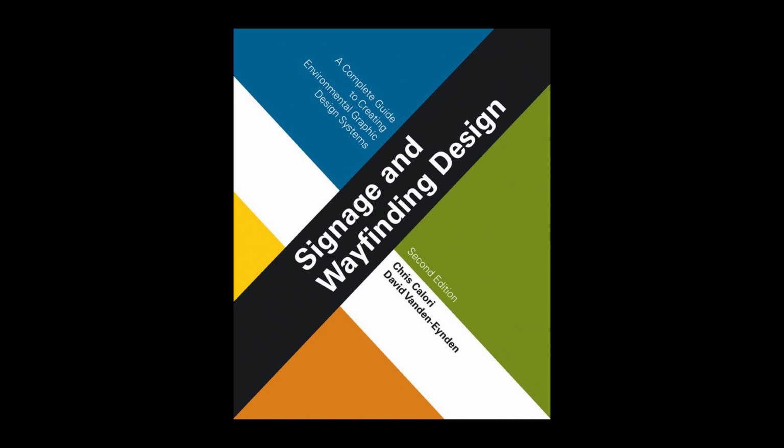Note that some EGD and architectural offices avoid the use of the word approved on their stamps because it may imply the designer's guarantee of the fabricator's performance. In such cases, a less definitive word, such as reviewed or accepted, may be used, depending on project protocol.